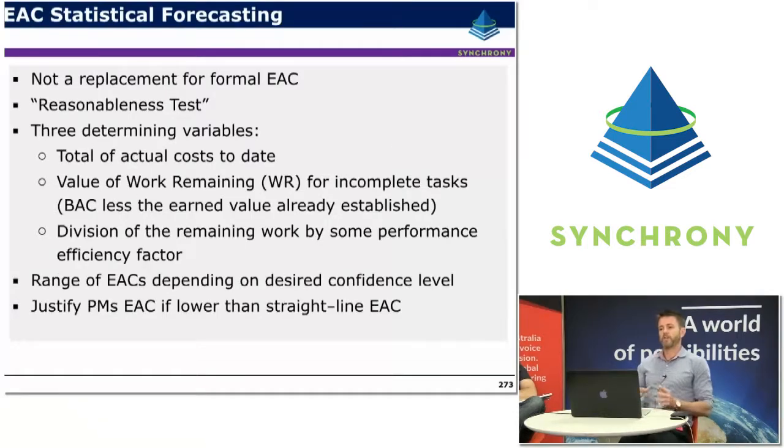Now the statistical forecast that we can use with EACs should never be a replacement for a formal bottoms-up EAC, but there are some statistical techniques that you can use just to do a reasonableness check, or a sense check, if you like, of how valid or how credible the numbers seem to be from your bottoms-up process.